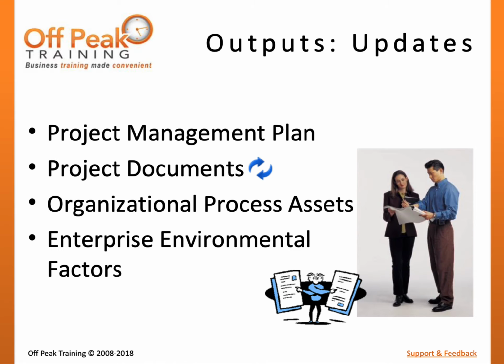Finally, many processes may lead to updates to the project management plan and/or project documents. Since the project management plan and other project documents are not subject to the same levels of approval that the baselines are, these updates will not require formal change control.